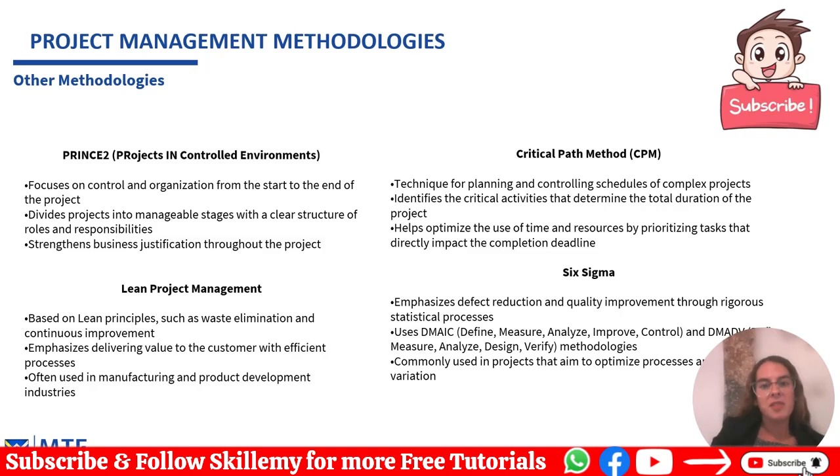Using CPM involves several key steps. First, listing all project tasks. This includes every task that must be completed. Another one is estimating durations. We assign an estimated time for each task. Determining dependencies. We identify which tasks depend on the completion of others. Identifying the critical path, the longest sequence of tasks that must be completed on time. This sequence allows project managers to prioritize tasks that impact the deadline and plan effectively.